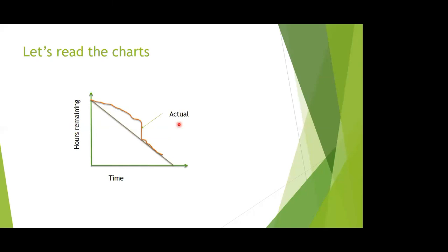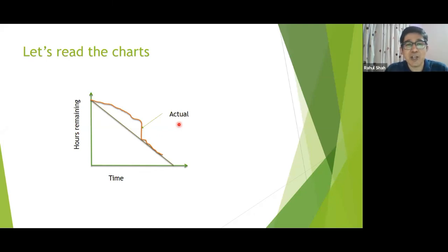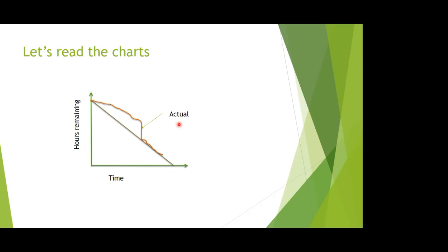I think initially there was a lag. I mean, it was not performing well, but as the sprints move ahead, they are coming on track. Yeah, looking at the data, reading the chart, we said they will be able to complete. They had a hiccup, but they will complete. But how do we interpret it? How do we get some insights from this one? Might be the scope of work changed, and suddenly they aligned with the actual scope of work, and most likely now they will be completing as per the target.